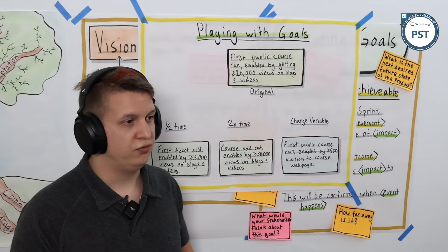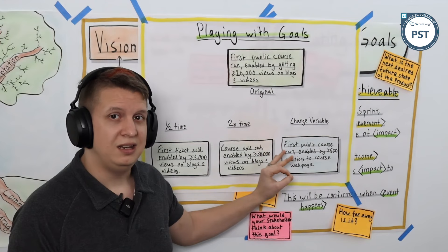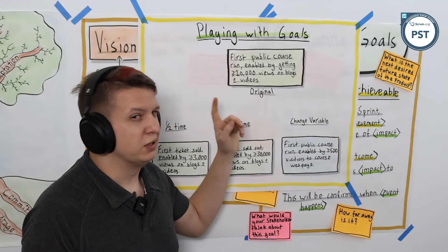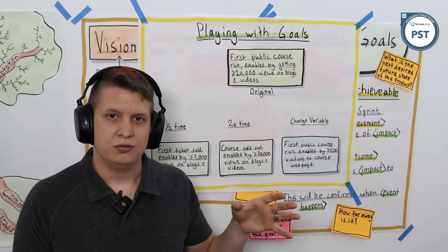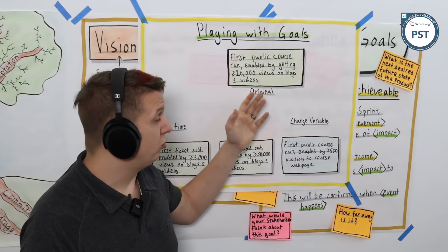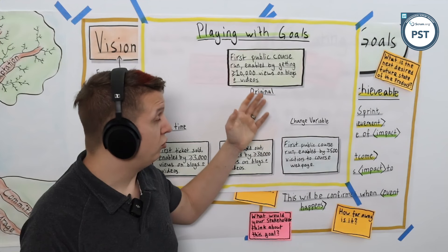And the key thing is to validate continuously. Check in, are we making progress towards this? Is this thing actually working or not? Because let's say you get to 10,000 views on your blogs and videos but you haven't sold a single ticket. Clearly that is not the leading indicator for the lagging measure you would like to influence. So you need to find a different variable to tweak, which means you might need to scrap this goal and make a new one. And that is part of the learning process.